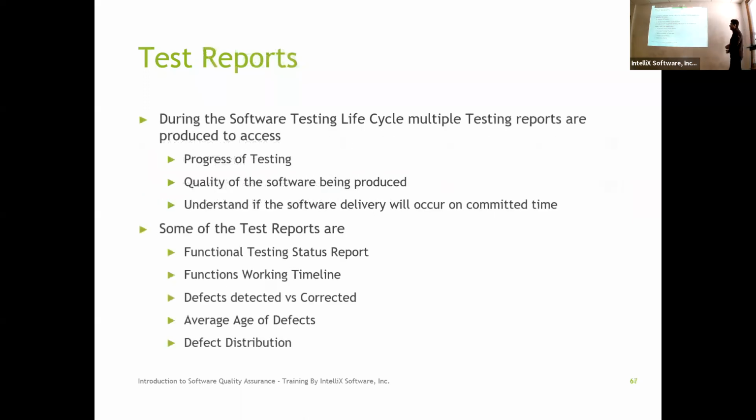Okay. And as you go through the testing, right, you're going to build reports. So that's what you identify in the test plan. What kind of reports you will be producing, how frequently, and who all will be accessing them, right? So you may just say, how is my testing progressing? Well, I initially estimated it was going to be 200 test cases to test this system. I've done only 10 test cases. So that means I'm done only like 5%. How long is it going to take me to get to 100%?